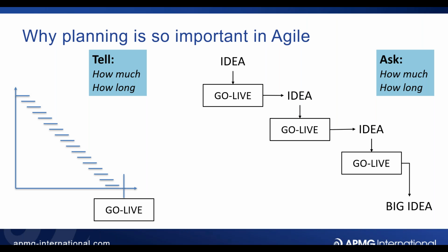Thanks, Phil. At the proposal stage, how do you compete with a waterfall approach that can offer a bottom line cost for their end-to-end plan compared to Agile? Okay, we still do that. These 2 blue boxes on this slide, but what happens is it's where that information comes from. That's what's really changed. So if I'm doing a waterfall approach, I work bottom up to add up all the activities. So this is how long it's going to take, and this is how many people I need to do it, and this therefore is how much it's going to cost. So we're very much in the position of telling people this is what it's going to cost.